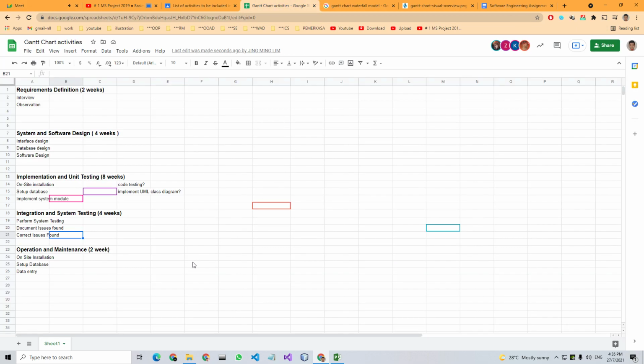Your developers also: if you have five developers and you decide that each developer will handle one module, that can work, because you only have five developers, right? So the customer module will be handled by one developer, developer one, and then the inventory module will be handled by developer two. The supplier module will be handled by developers three, four, five, and so on.